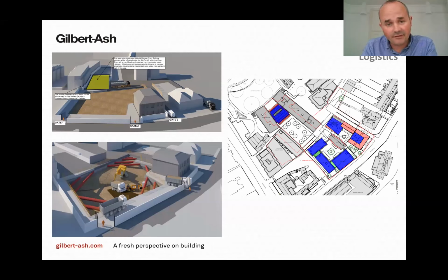The fundamental driver for us was ensuring that Park Terrace is free and open to the bus lane at all times. It's a very busy road with the bus routes. You would have a bus passing down that road every minute and a half, 2 minutes. So it was critical that we maintain traffic flow.